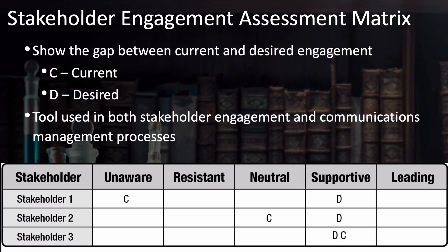Looking at the stakeholder engagement assessment matrix: stakeholder one is currently unaware of the project but you'd like them to be supportive; stakeholder two is currently neutral but you'd like them to be supportive; stakeholder three is already where you want them — supportive. This table doesn't currently show anyone as resistant, which is actually not very realistic — you'll very likely have at least some stakeholders that are somewhat resistant, especially at the beginning. For those who are neutral, you'll probably want to keep an eye on them, because as they learn more about the project they'll likely make a decision one way or the other.